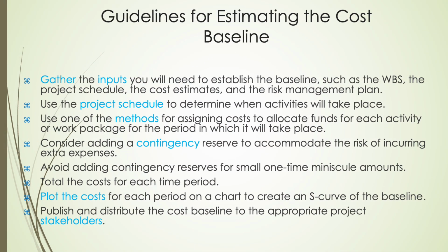Now, let's walk through the steps for building the cost baseline. First, gather all the necessary inputs. This includes your work breakdown structure, project schedule, cost estimates, and risk management plan. These documents give you the full picture of what needs funding and when.